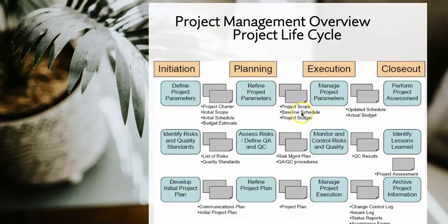Okay, so you look at your project scope again if it's going to change, because oftentimes when you come up with a project idea, it can be so massive, and when you meet with your supervisor, they will tell you, no, this is too much. So you have to scope it down further. So once all of these have been approved and you're happy with it, your supervisor is happy, then you review the schedule and then come up with your baseline schedule that you would then use to manage the project till the end.